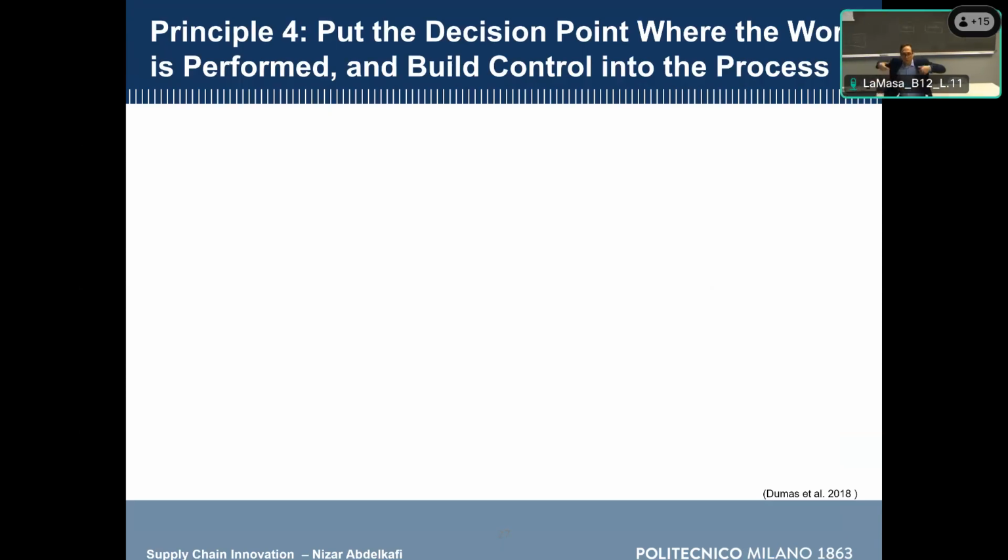Why not empower the site engineer, in the sense that we provide decision responsibility to the site engineer, so that he or she can decide about the equipment to be rented or not. In this case, we will not need the approval from the works engineer. The one who needs the equipment will decide and make the required approvals in order for the equipment to be rented. So this will reduce the complexity of the process a lot,